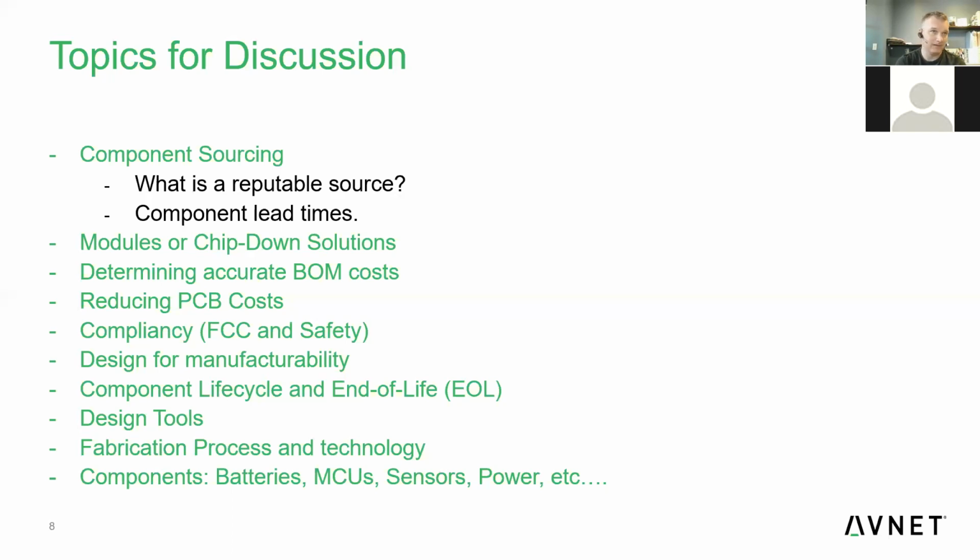Just recently, we were working with a creator, more of a startup company actually, that were not necessarily in the program, but on the peripheral list. They were helping out with some things, and they were pretty much headed right into production. They were picking a CM, everything. And they found out that the display they were using, and I think they used several of the displays in the product, was actually end of life. They basically couldn't buy the product anymore.